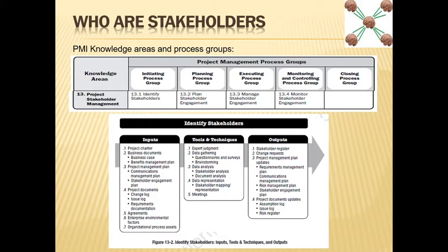Then you need to have the benefits management plan that says, okay, this project, what kind of benefits it will be giving to which people. So those people, if there are any, also become stakeholders because they are the end users or the receivers of the benefits. Because everything that you get, every document and every indication or idea that you get for a project, you need to identify stakeholders from that, because maybe those people have some effect on your project.